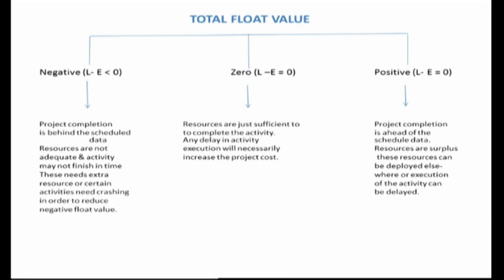Float can be positive, negative, or zero. When the total float value is negative, it means that the project completion is behind the schedule date. Resources are not adequate and an activity may not finish in time. This needs extra resources or certain activities need crashing in order to reduce the negative float value.